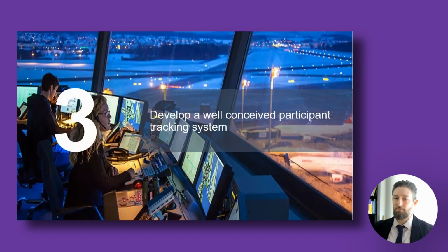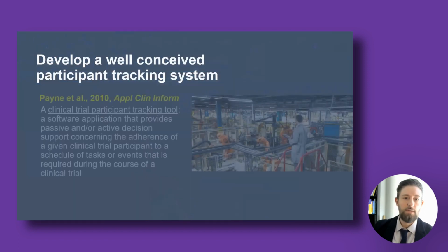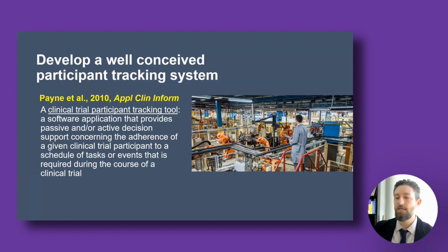The third point is develop well-conceived tracking systems. So you are trying to manage 16 or more conditions. What do I mean by that? It's any software application, and I use Excel, so it's not that fancy. But there's fancy ones out there that provide passive and active decision support concerning the adherence of a given participant throughout the entire clinical trial process, from the time they are screened until the time they complete the last data measurement. You need a system that tracks these folks across every study activity.